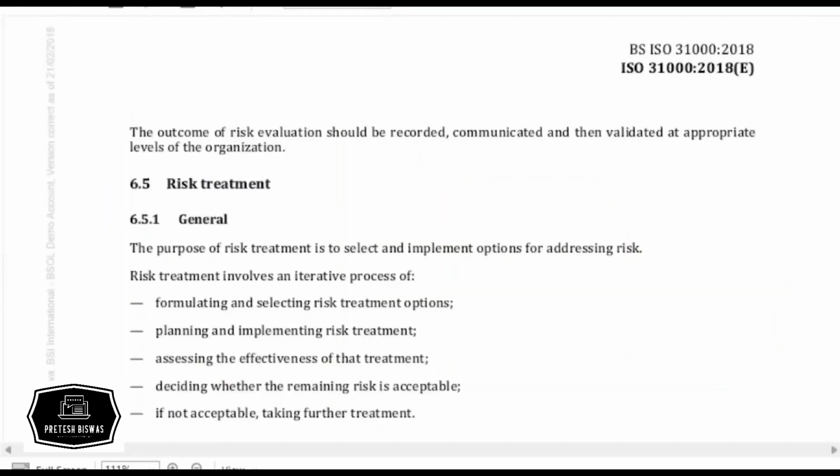Continue to retain the risk because there is nothing further we can do to address this risk. You'll never find a solution for everything. I'm just taking an example. If you find a solution, fine. If you don't find a solution and it is not cost effective, for example, somebody will say we will give everybody a car and let them come by their own car instead of taking the cab, and we'll pay for it. Okay, it may not be a cost effective solution. So they say that is not cost effective. So we retain the risk by continuing to use the cab drivers, but we'll try to improve our processes. So that could be a final decision.